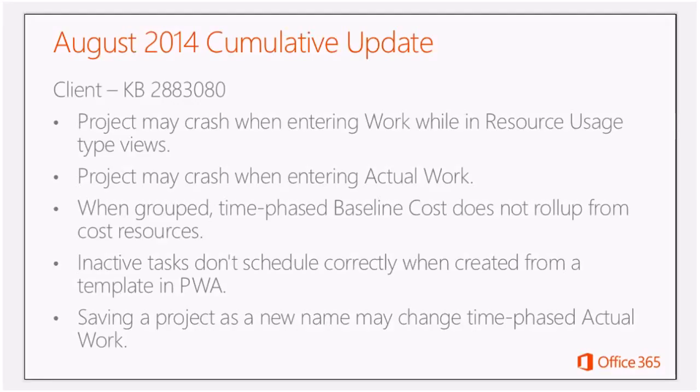They open up the project in Project Professional and they look at that given task and they make it active. Instead of being a 20-day task, it's a one-day task. In fact, it didn't matter what you set the duration to, it was always going to be a one-day task. So we've now corrected that so the duration will be what it was when you created that template.